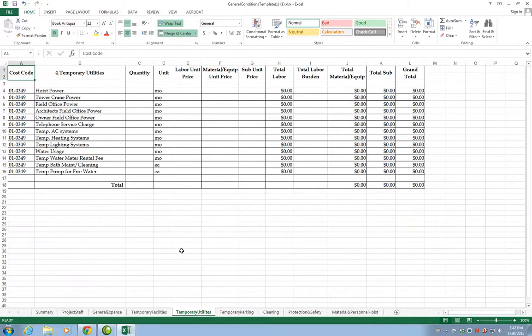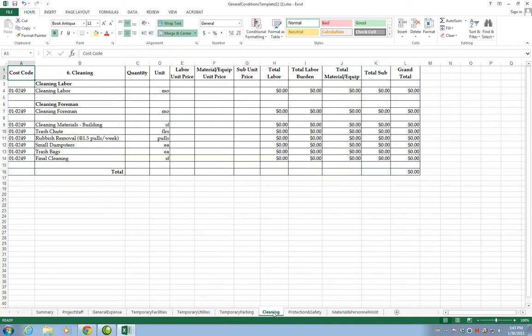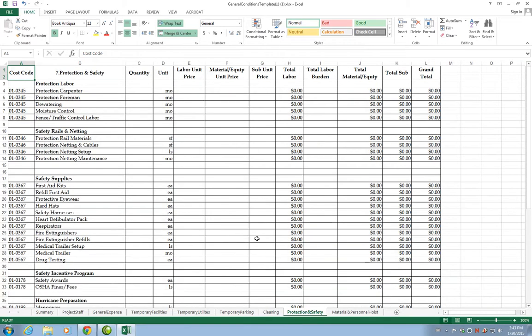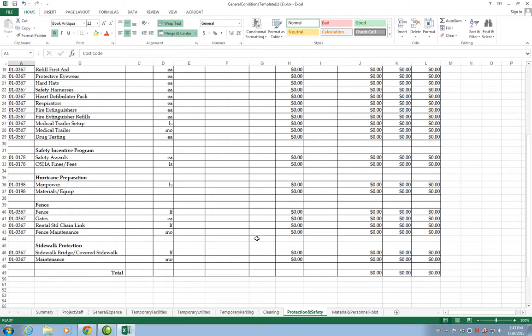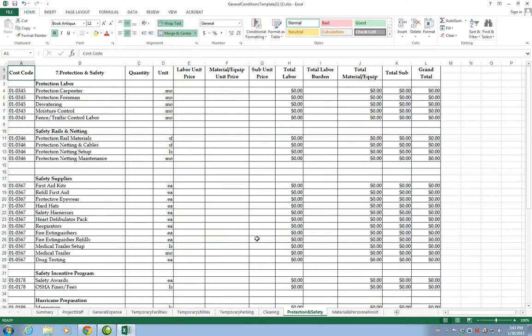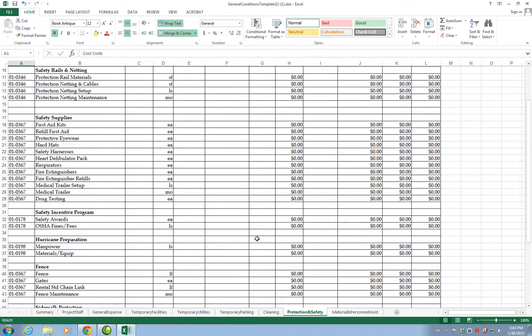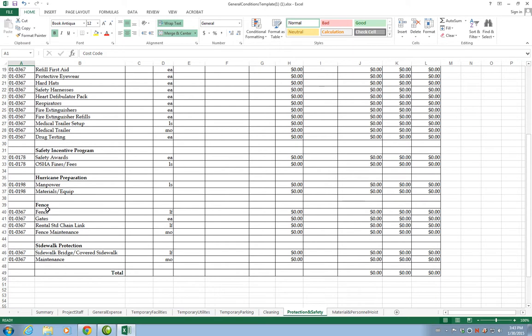Temporary utilities: phone, electricity, water, temporary parking. If you need to pay for additional parking, then this will be the place to store that number. You need cleaning crews that will clean up the project after every day. You will include here what will be the cost for that. Protection and safety. You need to have safety in your particular project to protect the employees that are working over there. You need to have first aid kits, gates, fence, chain link, for example. Part of the homework was to identify how big this chain link may be. Then we basically enter the cost over here.